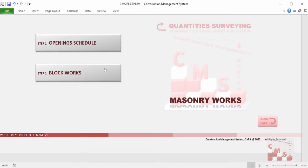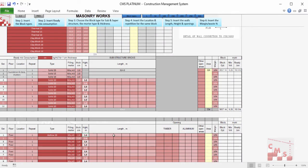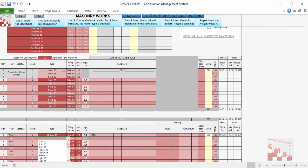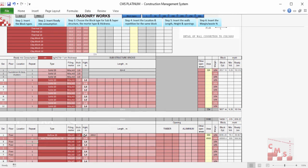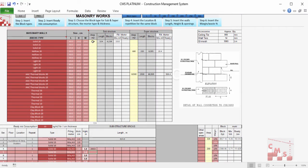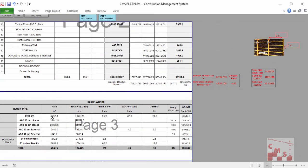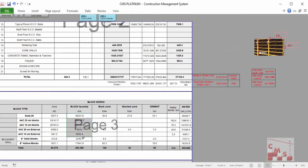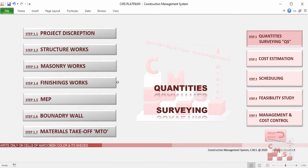The same can be done for masonry work in a very easy way. When we choose the type, height, and length of the block — whatever the block type — and choose the mortar type, CMS will give us directly for each block type: the required area, the number of blocks, and the quantity required as mortar. This is also reflected in the material takeoff, showing all block types, block areas, block quantities, and required mortar material — whether ready mortar or site-mixed with sand and cement — all coming automatically from CMS.